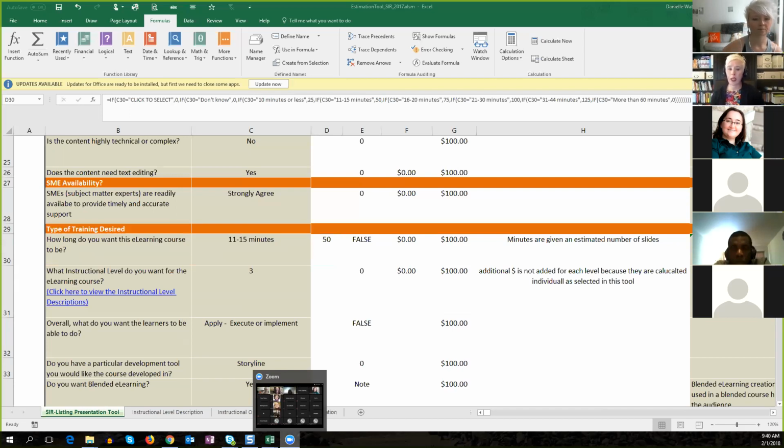And so when we look at how long it's going to take to do the storyline, our storyboard, we can sort of divide. Again, we look at our baseline data. So in our time management tool, we track by storyboard. We track by our deliverables that we're going to bill on. So we track like project kickoff, building the template, storyboard, gathering resources. So we basically take our stuff in Basecamp and translate that into our time.